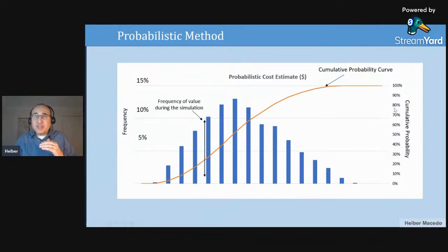But in 40% of the scenarios, I will have a cost overrun. So maybe I can define a contingency to protect my business and my execution. The probabilistic methodology is going for the top level of cost estimation in my view. And I believe that in the future we need to move, and move soon, to use this technique in the majority of projects.